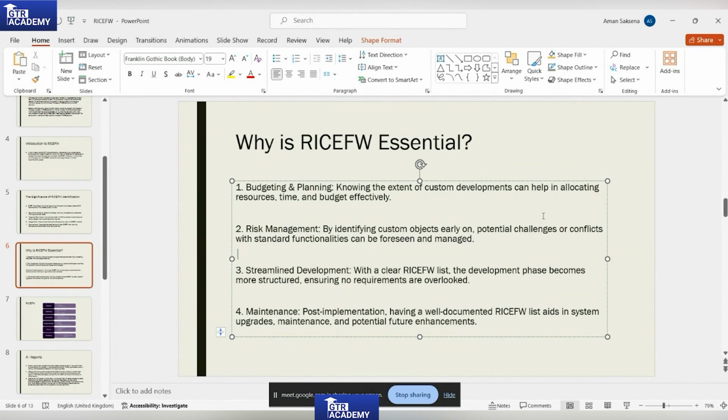So we made one invoice status report. The client had some custom requirement. We had to link it with the third party interface. So that report was customized. All these things needed to be incorporated. New tables were created. So to incorporate all those changes, what are the potential challenges? We need to list out any challenges in a document that is called a change request document: the cost, budgeting, timeline, if there are any conflicts.